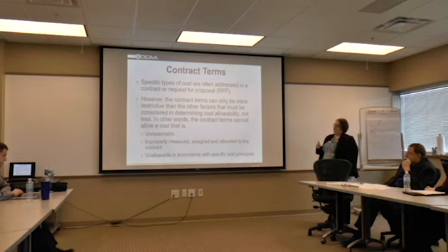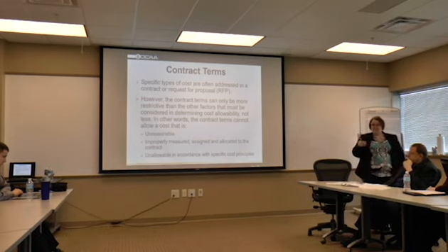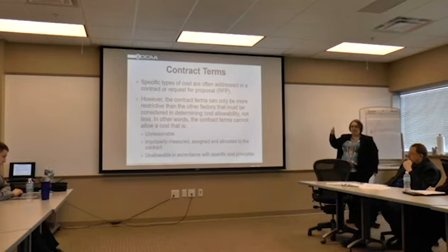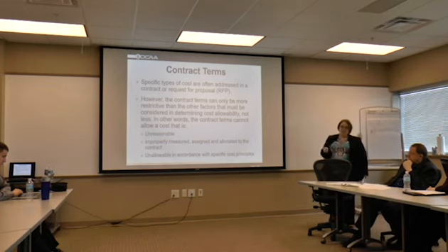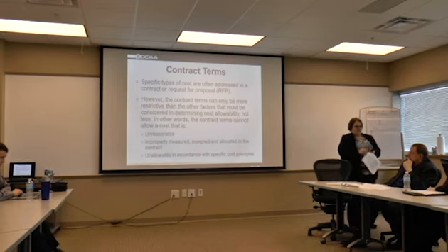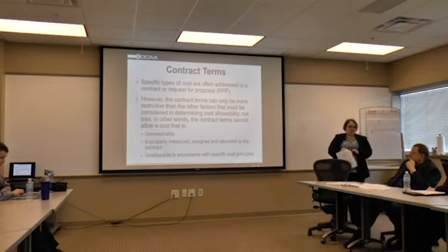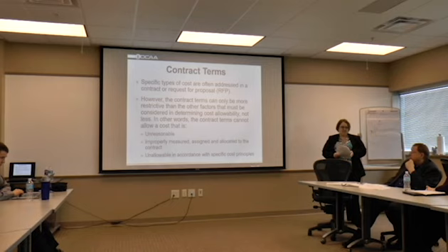They couldn't, but they can limit the G&A. They could set a G&A rate, but it usually says X percentage or their actual G&A rate. A lot of times, what I've seen recently is that contracts have said they are not allowing G&A on material costs. Have you seen any specific contract terms related to limitation of cost recently? The G&A limitation, that's it.